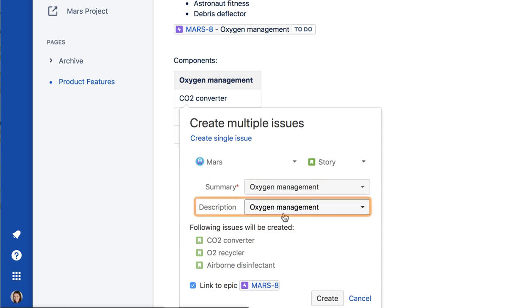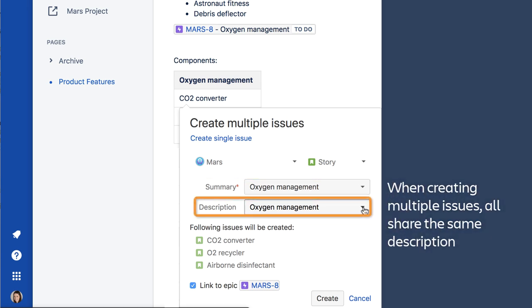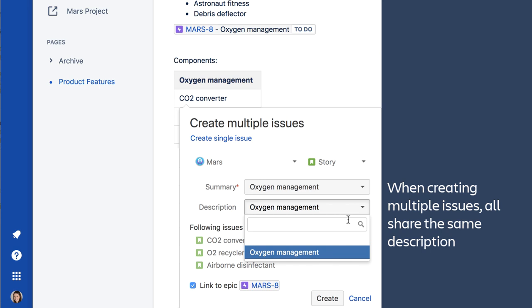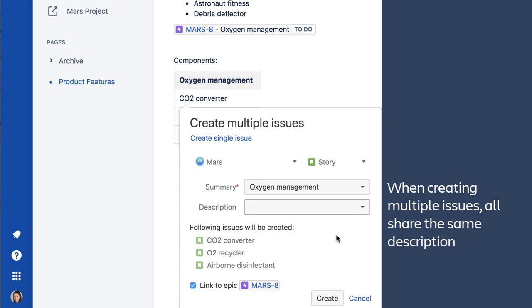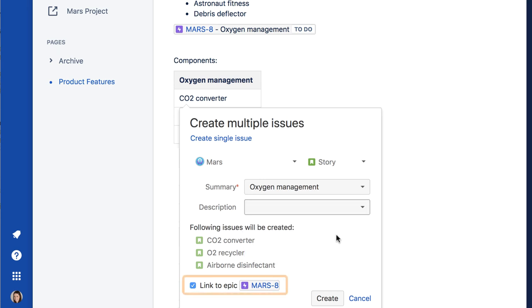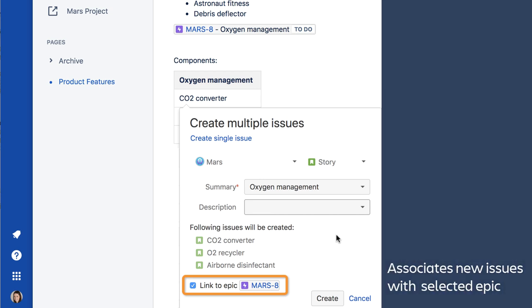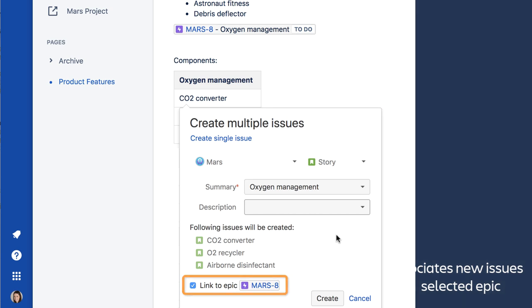Be sure to clear the description. Otherwise, each issue will have the same description assigned to it. Make sure the Link to Epic checkbox is checked. This will associate the new issues with the selected Epic. This particular Epic is shown here because there is a link to this Epic on the page.